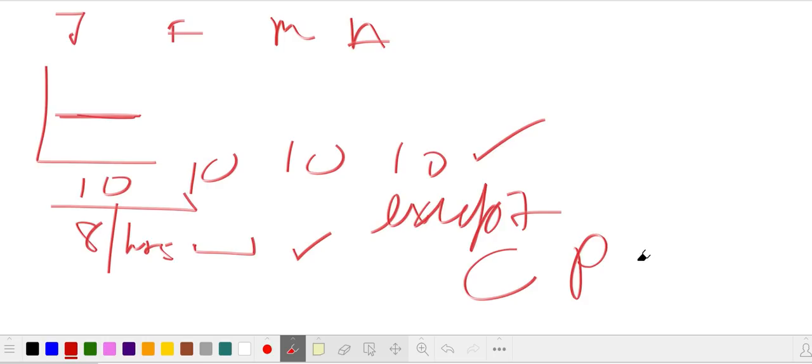But if it's the critical path and it's an emergency, we're going to smooth that out. We can give 10 hours per day. Although no company wants to give overtime, so they might increase the developers. Instead of 10, they're going to put 11, just because they have to complete the critical path. You got it.